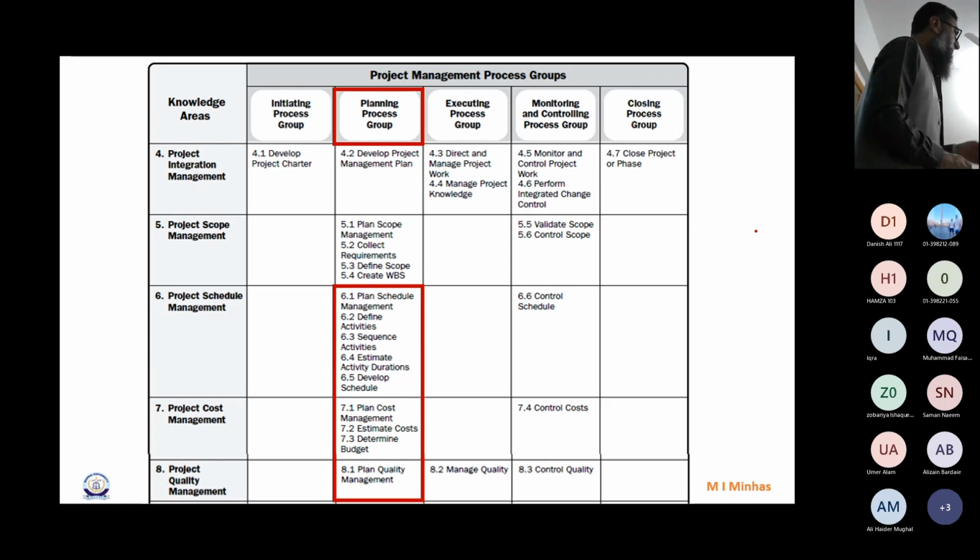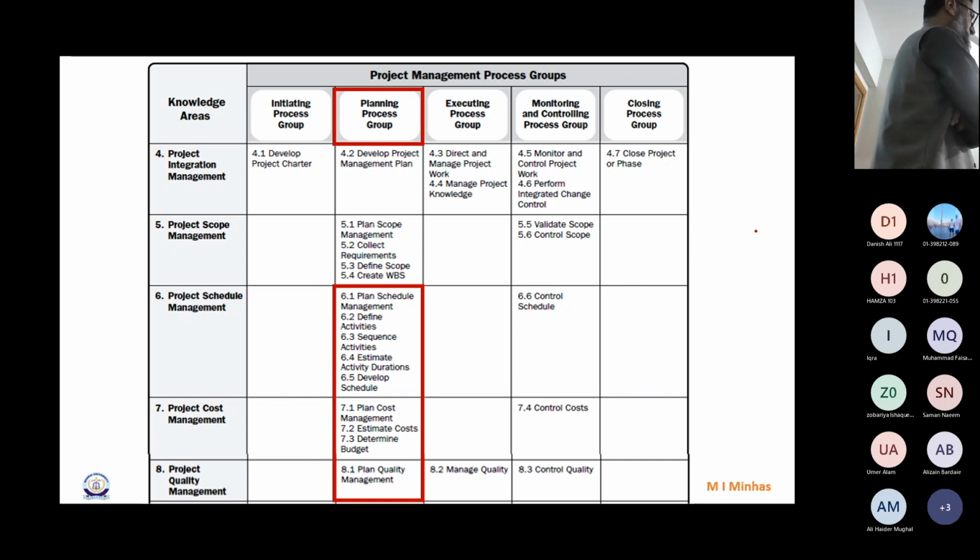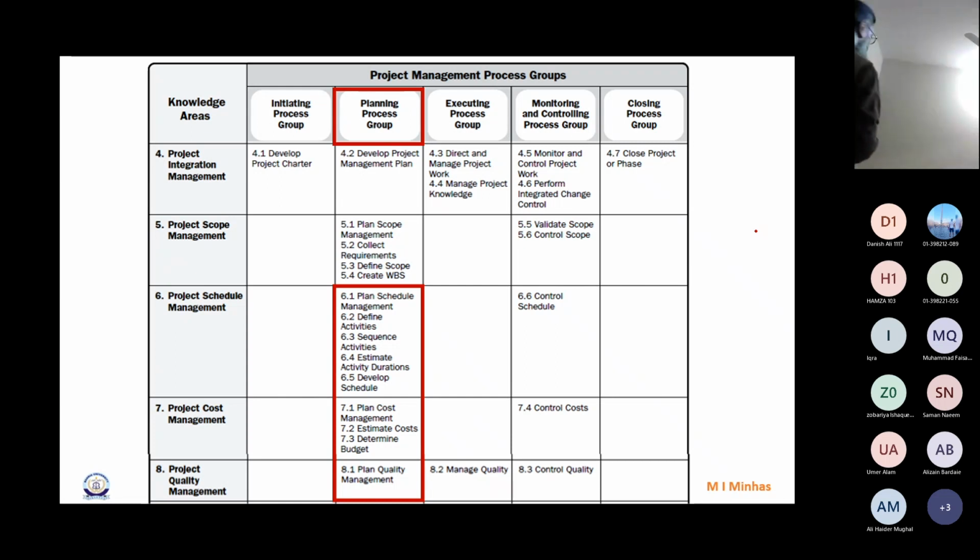So you said control quality is done within your team. Yeah, but verified is also within your team. Once you verified, you call your customer. Correct. And then the customer would come and check that our team has checked, now it's verified for our team. You come and you see it. If the customer accepted, then it would become a validated deliverable. Verified and now validated, right? Okay.